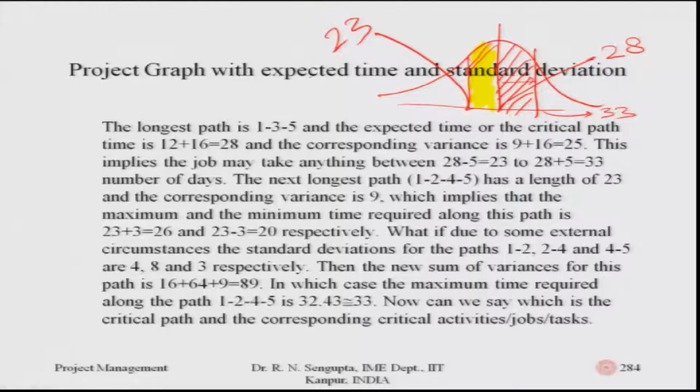Now, if you look at this distribution, if you follow the simple concept of standard deviation, it would mean that within the number of days between 23 to 33, you are assured that you will be able to cover, in a very theoretical sense. I am just first mentioning the theoretical concept, that the overall area of coverage is about 1 standard deviation onto the right and the left. So, the overall coverage, let me go into just the values, it may not be exact, is about 67.